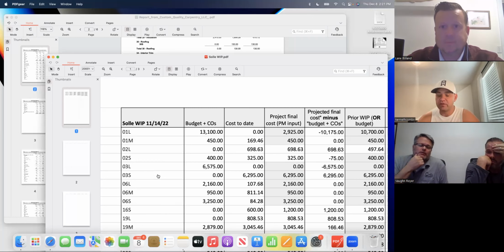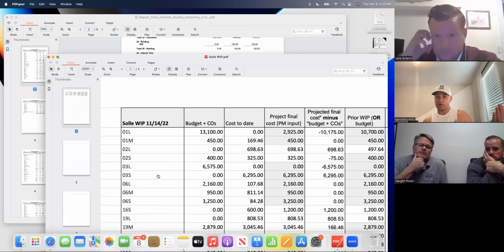Yeah, cool. And this answers the question as to how granular it is. It's line item by line item. Correct. We do it every month, and the whole point of it is that it gives you the opportunity to, one, confirm that you're staying on budget, and two, when you're not on target, let's say it's a mistake and you've lost money, to look for other opportunities to make that up so you don't lose any GP.